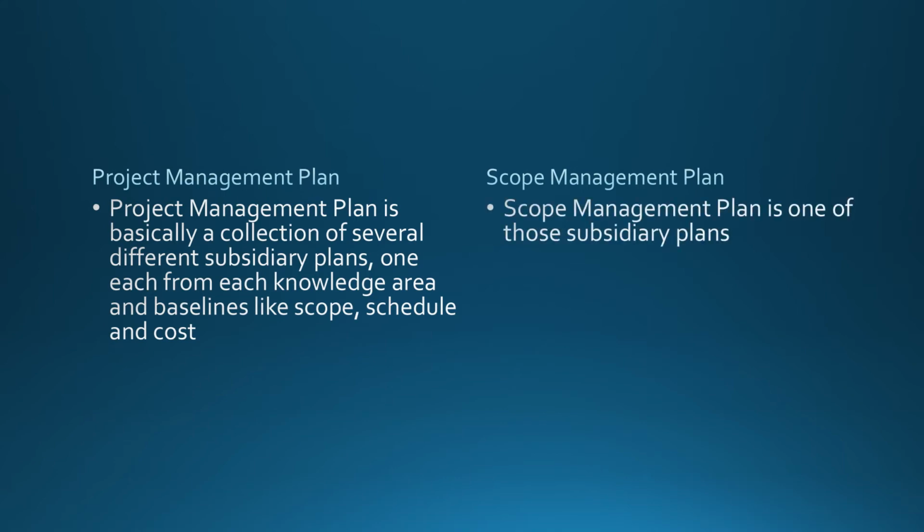While when you talk about the scope management plan, it is just one of those subsidiary plans that is a part of and makes up the project management plan. So scope management plan is just one of those subsidiary plans. Project management plan is a collection of many subsidiary plans.